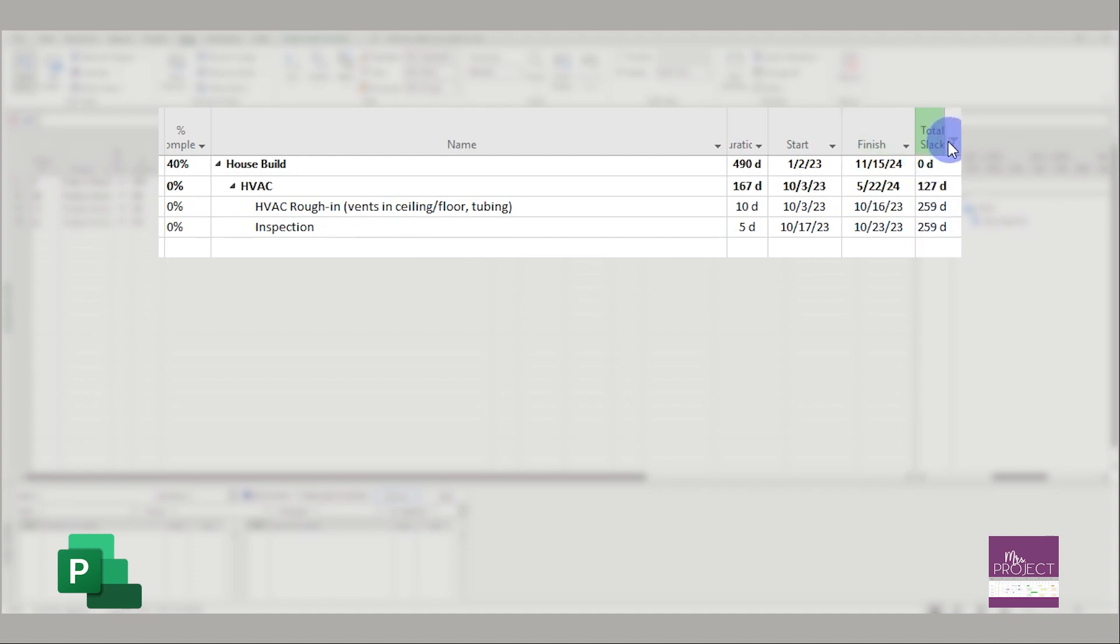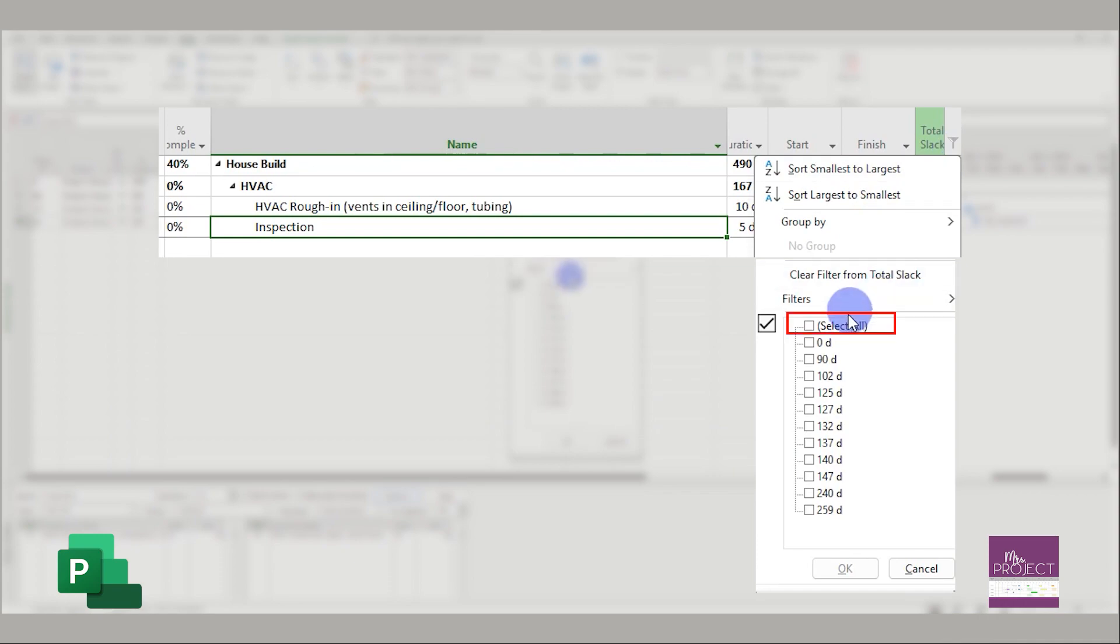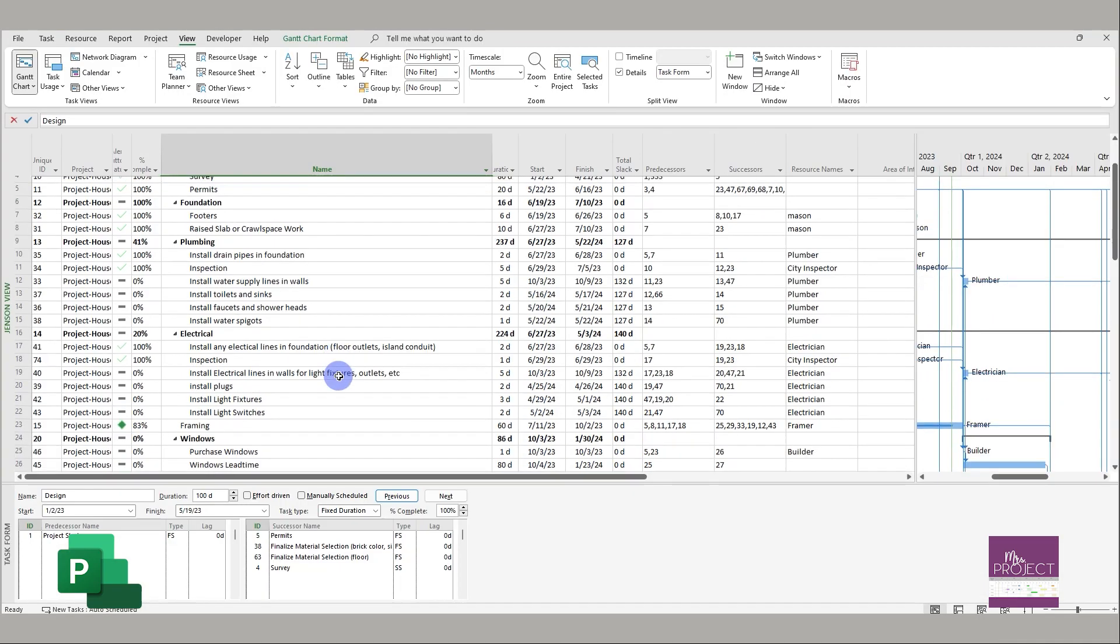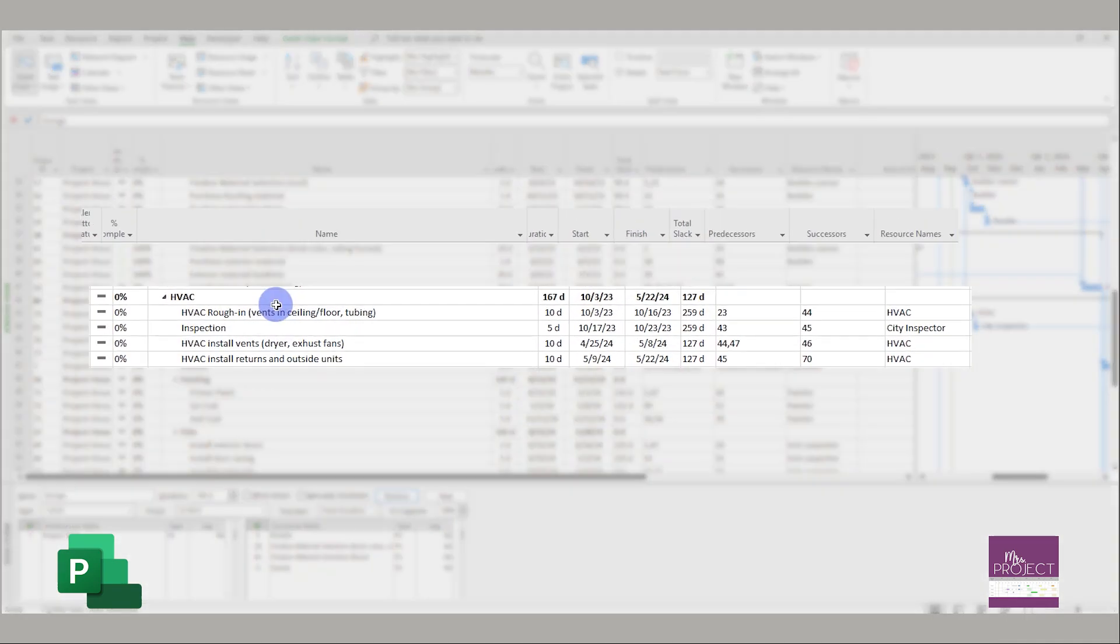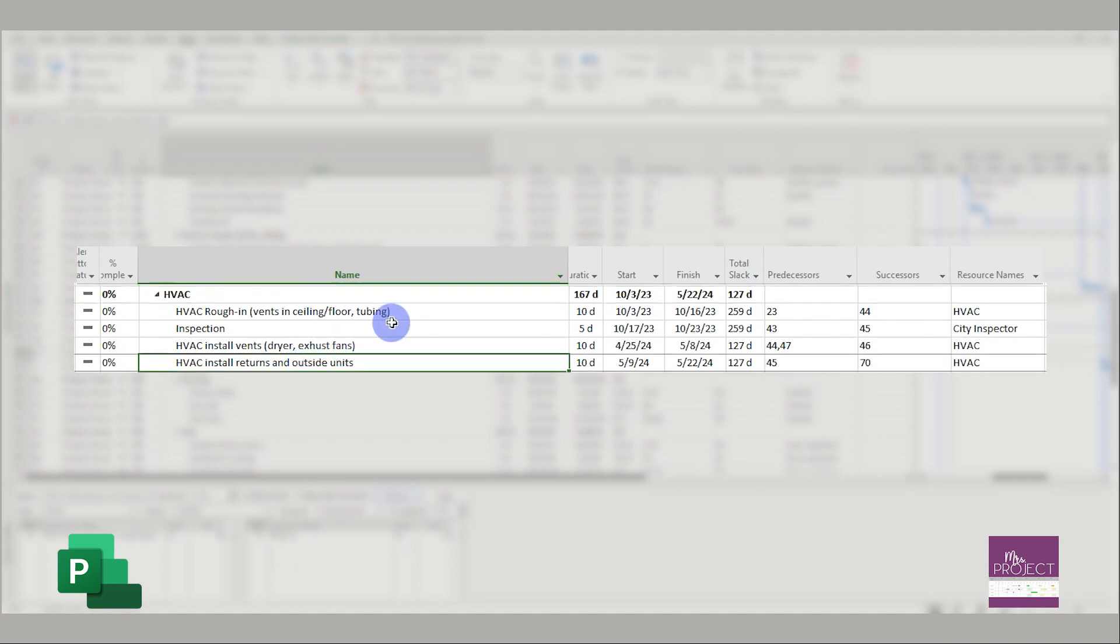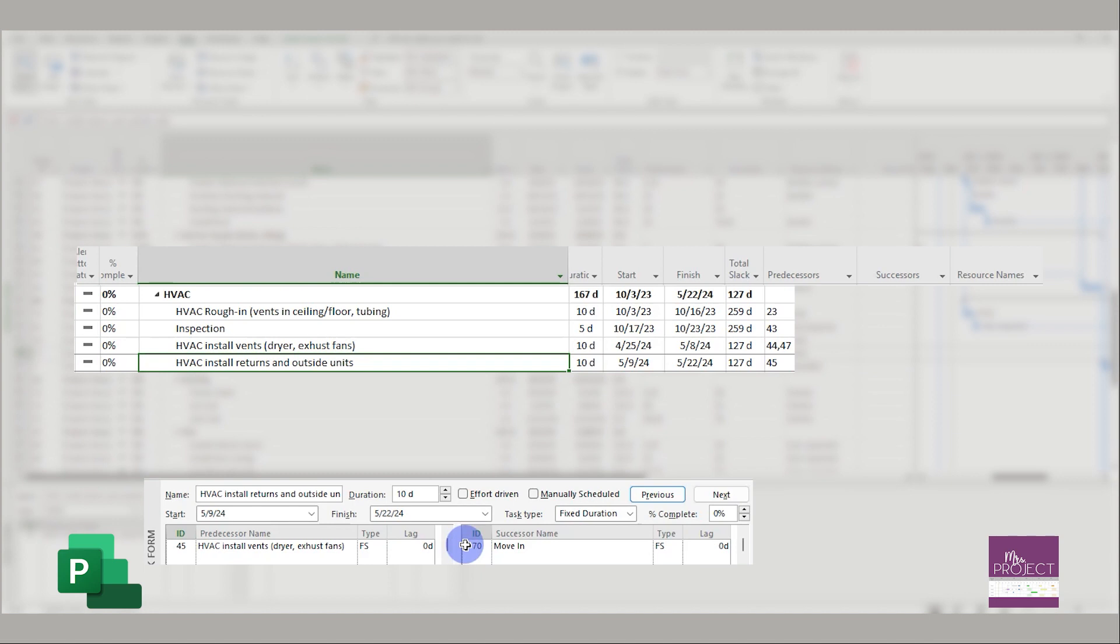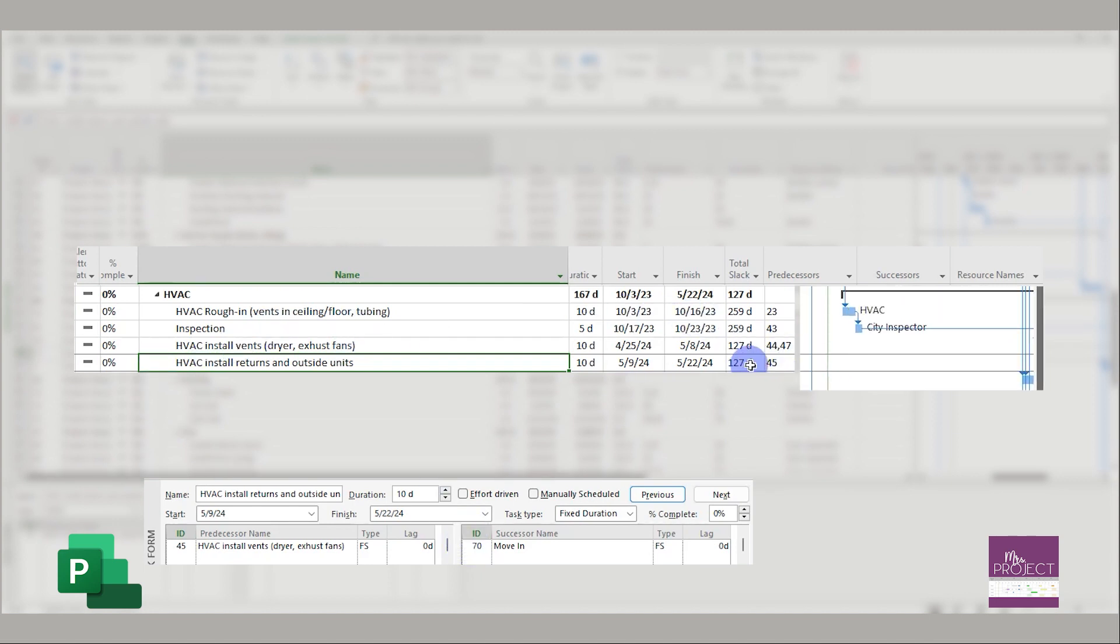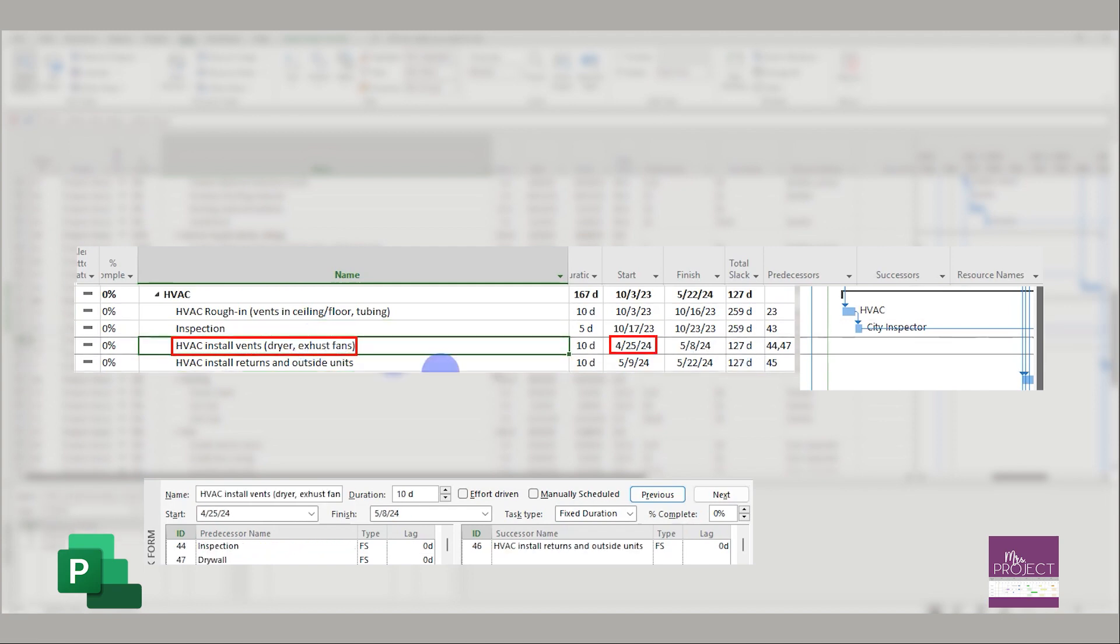Well, what is it related to? If I click on this it's saying okay, we have to install the vents. I'm gonna go then look at the HVAC section. Why is there so much time? You can see here that it's saying that having the returns and outside vents installed for HVAC isn't required until move-in. Well, that's why I have such a big slack. Move-in is far away, and the city inspection—that's just a compound of this 127 days and then the slack between the inspection and this.